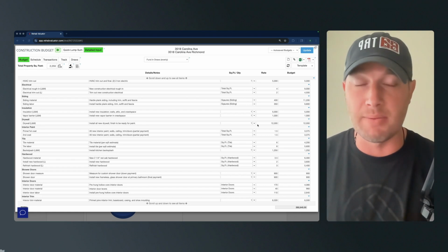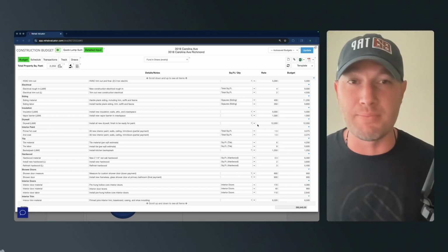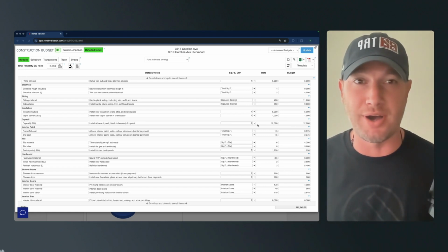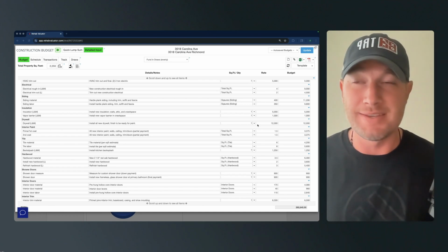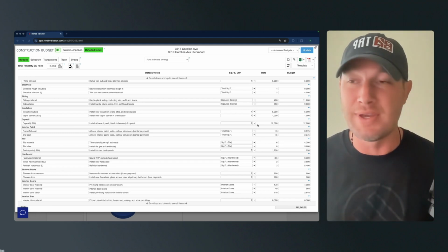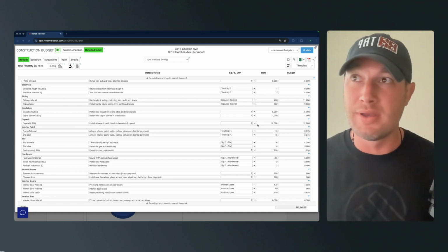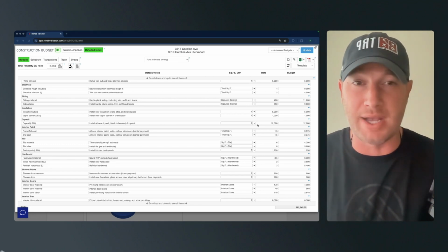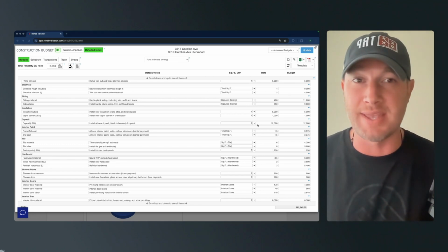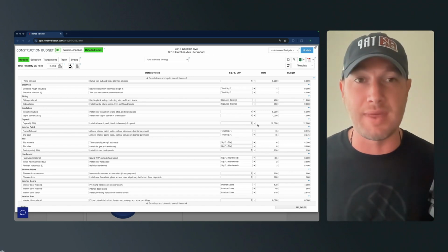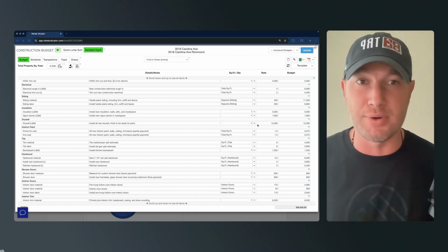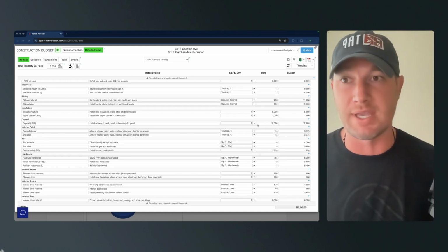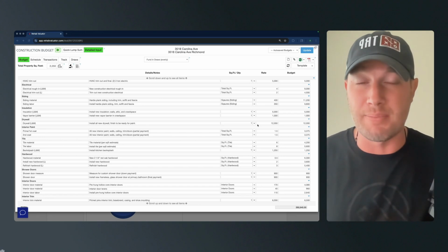But I always tell people, don't go in there and start counting boards by yourself when you're estimating costs and think that you're going to be accurate. You're not going to be. I'm sorry. These guys are really, really good at what they do, and even they will misestimate the amount of boards that they need for every project. It happens all the time. You're going to think you know exactly how many boards it is. You're going to count up 150 boards, whatever it is, and it's actually 170 or 120. You're going to end up in a bad place.